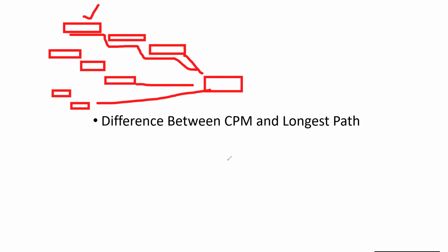If I define that my project should be finished by this date, then every path which is meeting this date counts. Say 15th of September is mentioned in my Enterprise, Project, Must Finish By area, which I just showed you in the Primavera P6 project file.